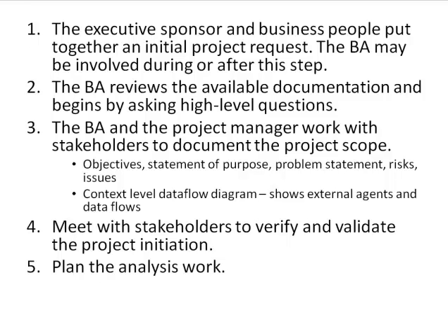And then planning the analysis work. You should definitely be involved in the planning for the analysis work because that's the bulk of your work is in the analysis phase. So you want to make sure that you are giving your input to the project plan for the analysis phase on how many different requirement sessions you think you need to have and how much time you'll need to have to do them. And the other thing that you always want to keep in mind is it's not just the requirement sessions, right? You have to do something with that information that you get in those after that. So you want to make sure you include time in your project plan for actually documenting what comes out of those meetings.